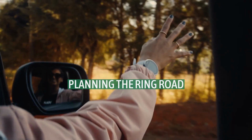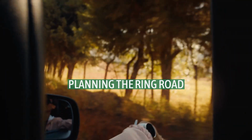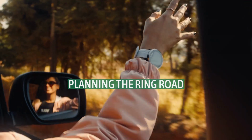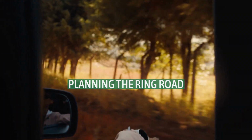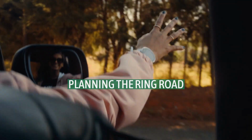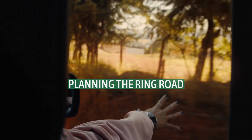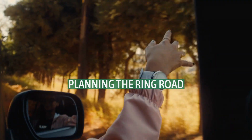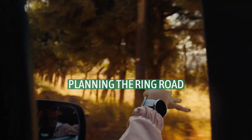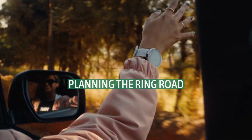The ring road plan remained active, and planners ensured that no new structures were situated close to the proposed route, to maintain its availability for road development. In 1955, with the upper level of the precinct completed, Gibson left Coventry to become county architect for Nottinghamshire. His replacement as Coventry city architect was Arthur Ling, who had been senior planning officer for the London County Council since 1946. Ling continued Gibson's work in developing the city centre, while also reviewing details of the development plan.